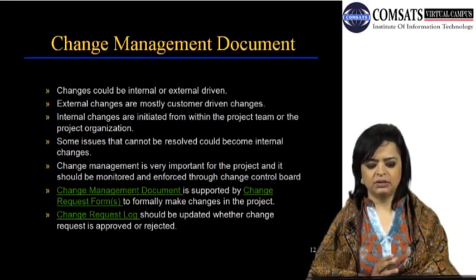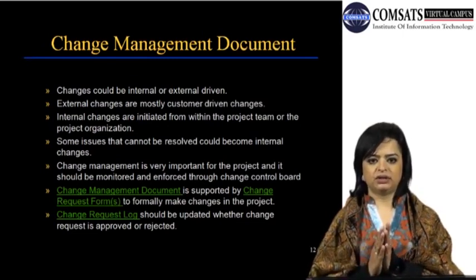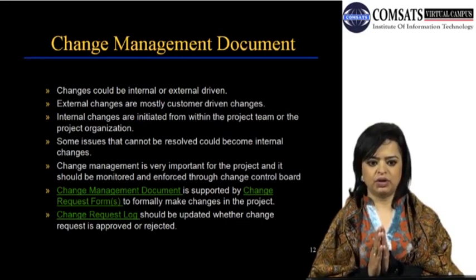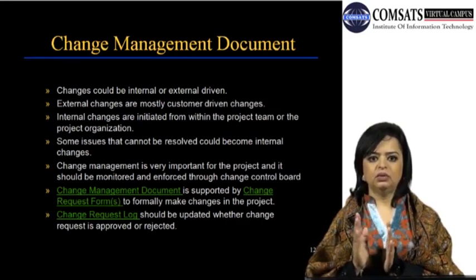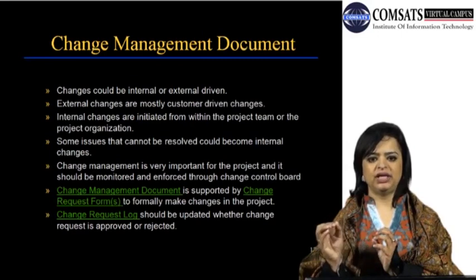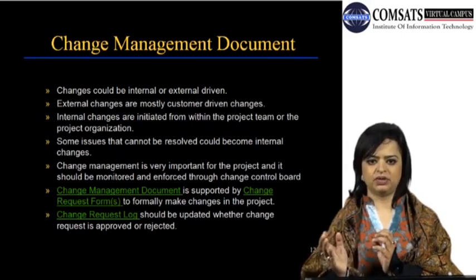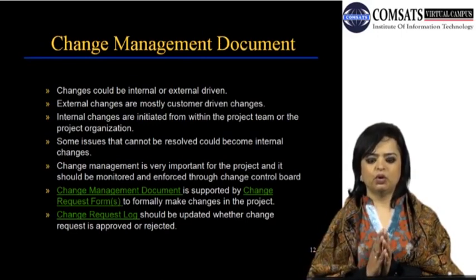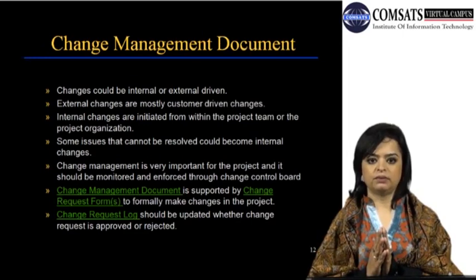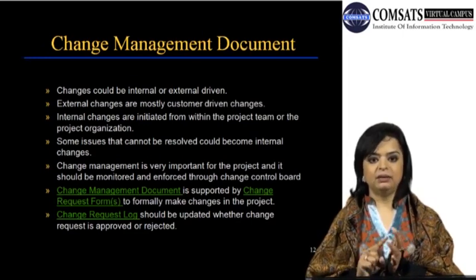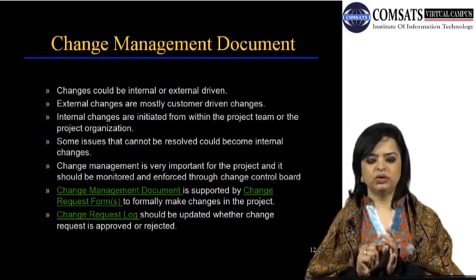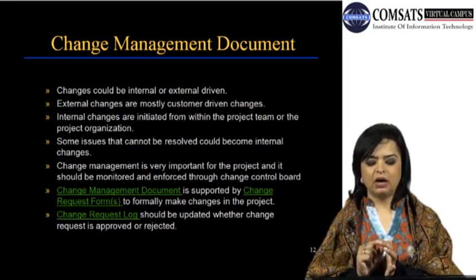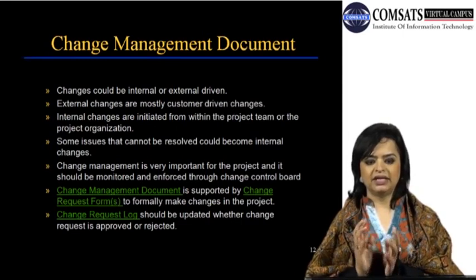So in a smaller project, any change which creates a change in end time or affects the triple constraint should be supported by a change request form, giving time, reason for implementation, who initiated it, how long, technical issues, estimates, budget, cost.